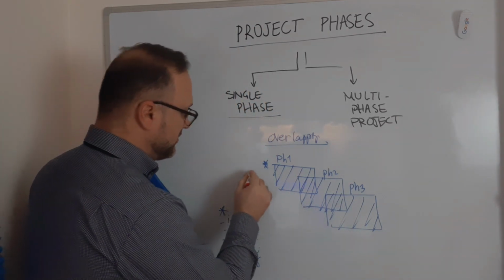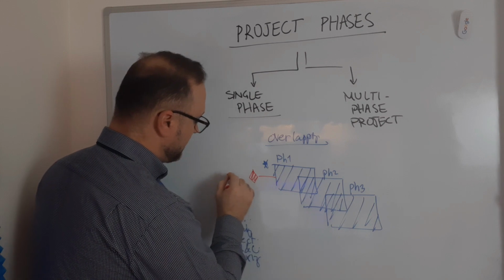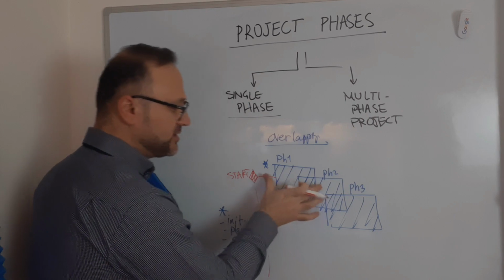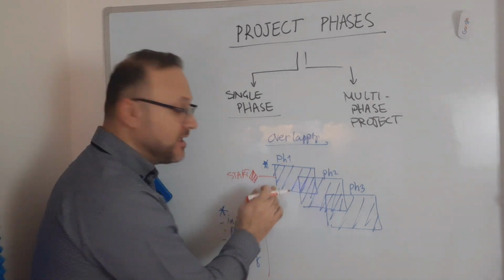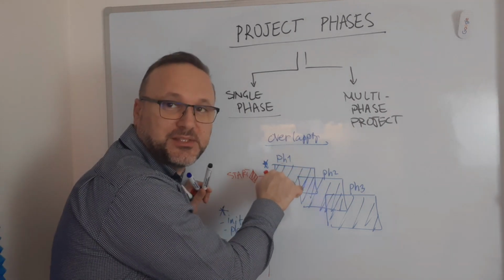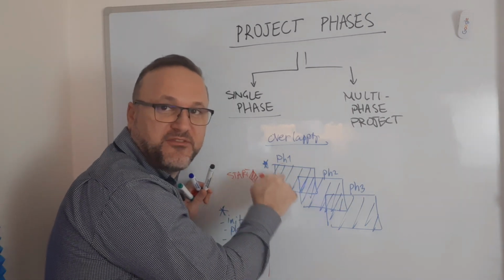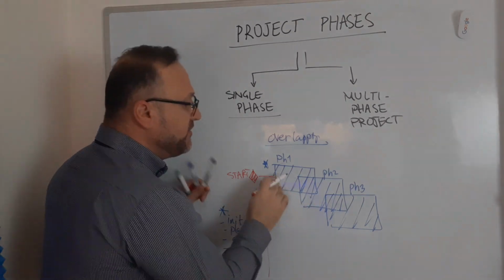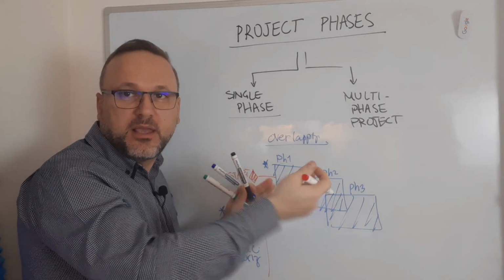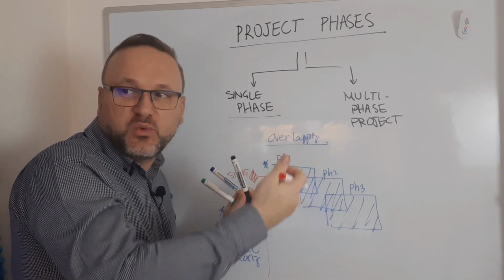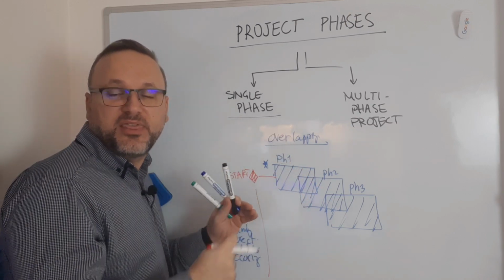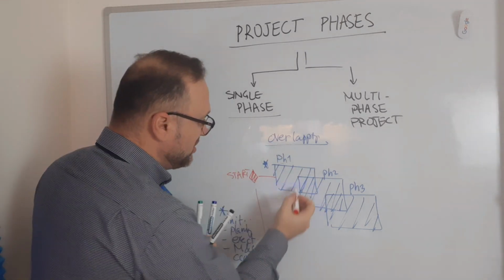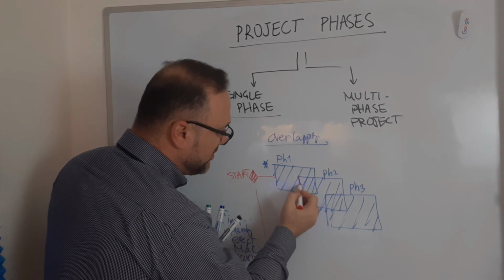I have here the start of the project. I started the project, I executed the first phase, and there is a condition inside this phase which describes that once I finish this condition, I can start with phase 2. So before closing phase 1 and during execution of phase 1, I will start with initiating phase 2, preparations of phase 2. So I start here with phase 2.